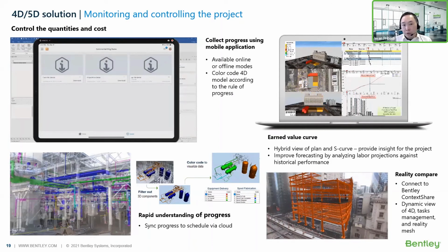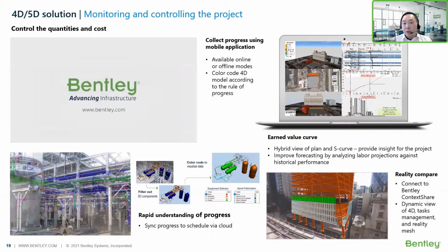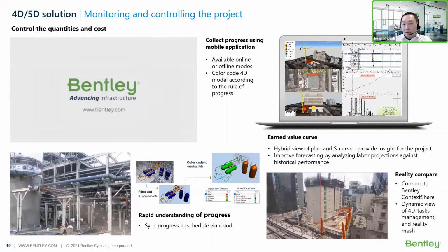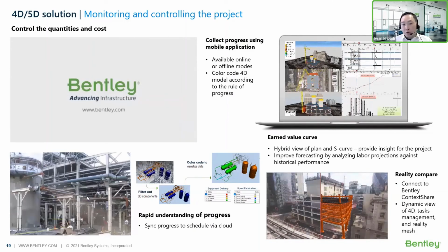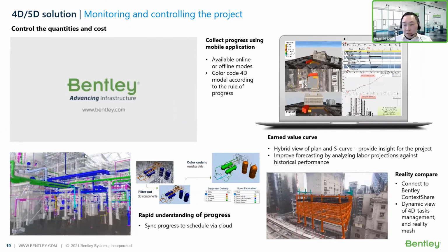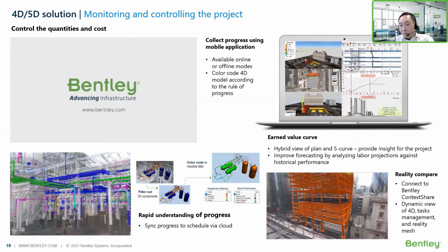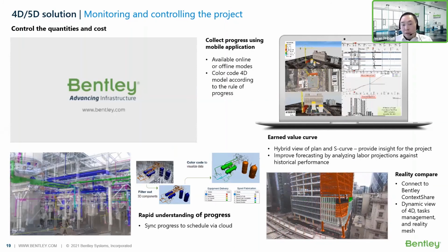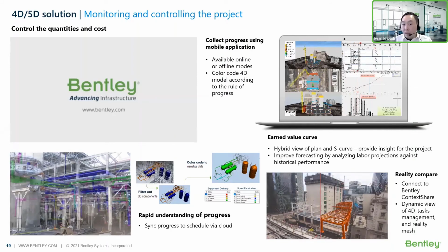it makes you faster and easier, because you can assign weighted percentages of your progress based on the color code that you choose. You can also deliver this and just sync it back to the server, and the rest of the team would understand. If you look at this example in the corner here, you would understand what is installed, what is being staged, what is completed, right? If you have to submit this report on a tabular basis, people don't essentially understand. But using color coding, you can rapidly submit and make people understand your progress quite immediately.